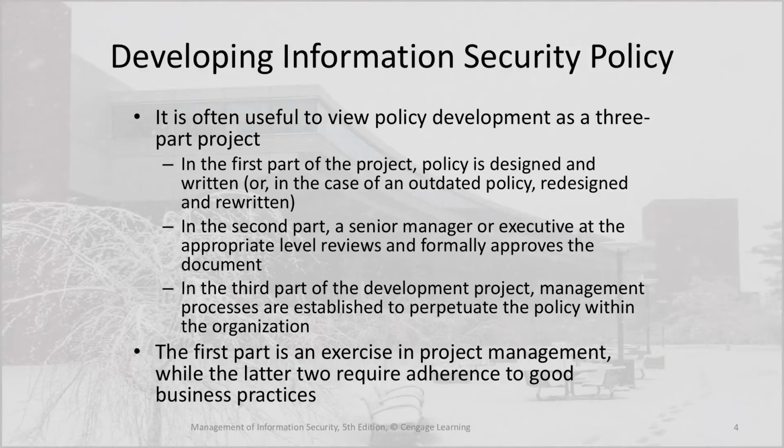It is often useful to view policy development as a three-part project. In the first part of the project, policy is designed and written, or in the case of an outdated policy, redesigned and rewritten. In the second part, a senior manager or executive at the appropriate level reviews and formally approves the document. In the third part of the development project, management processes are established to perpetuate the policy within the organization. The first part is an exercise in project management, while the latter two require adherence to good business practices,